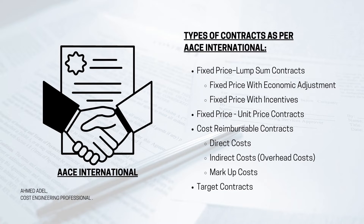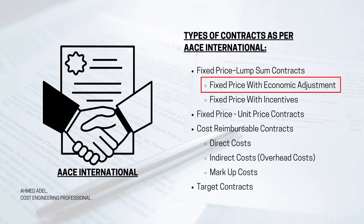We can add two small variations: fixed price with economic adjustment, and fixed price with incentives. With economic adjustment, it's still a lump sum contract — say 40 million — but if the price of steel varies by more than an agreed percentage (e.g., 15%), the contractor can claim additional money because the steel price exceeded what was considered at the time of signing.